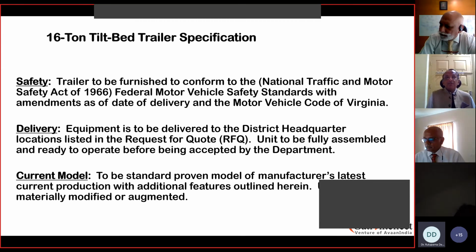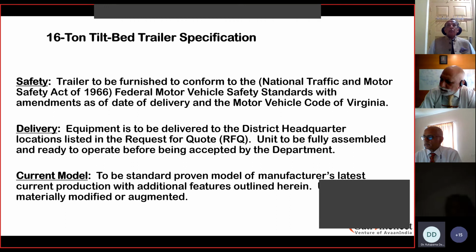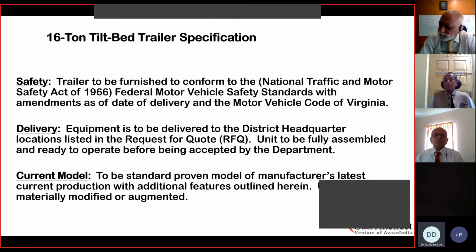So you mean to say that even if the specification given by the buyer has been superseded by the authorities, you have to follow what is being given by the authorities. That's what you're saying. Yes, we have to always follow the law of land. Right, but who is responsible for the additional cost? Yes, so that is a commercial discussion which has to take place between the vendor and the contractor and the owner. But the law of land cannot be deviated. Got it. Thank you.